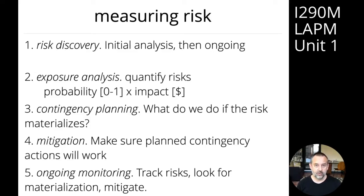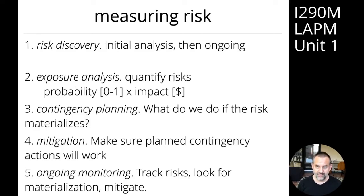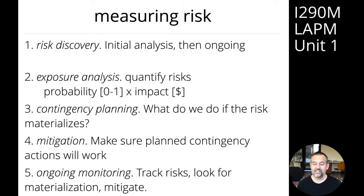Secondly, we're going to quantify those risks. There's a very simple formula: you take the probability of the risk materializing — between zero and one — and you take the impact of the risk in financial terms if the risk materializes, so how much it's going to cost if that thing actually happens. Then you multiply the probability by the impact and you've got a dollar value for the risk.